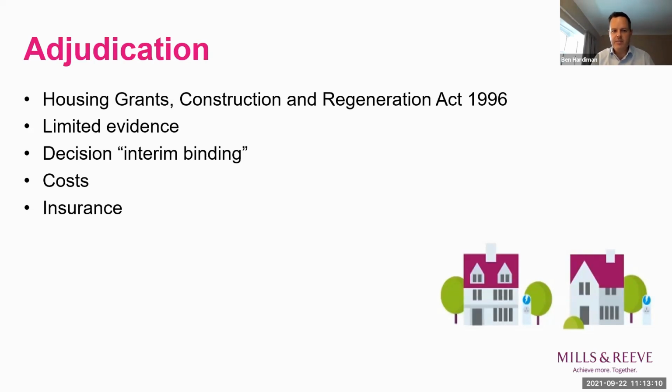That's obviously relevant to PI disputes, given that many will arise from latent defects which are just not apparent prior to practical completion and may not arise for several years. So there's no express prohibition on adjudication being used for PI related disputes. Parties can't contract out of the Act. So if there's a dispute, it is an option for the claiming party.